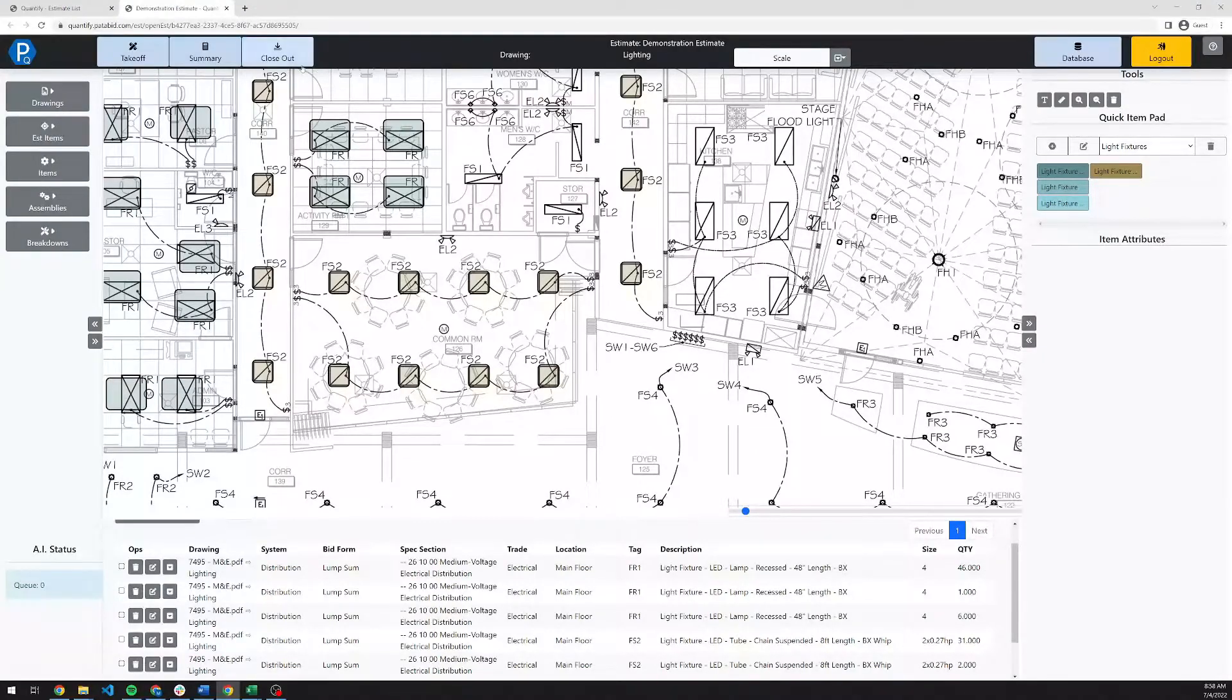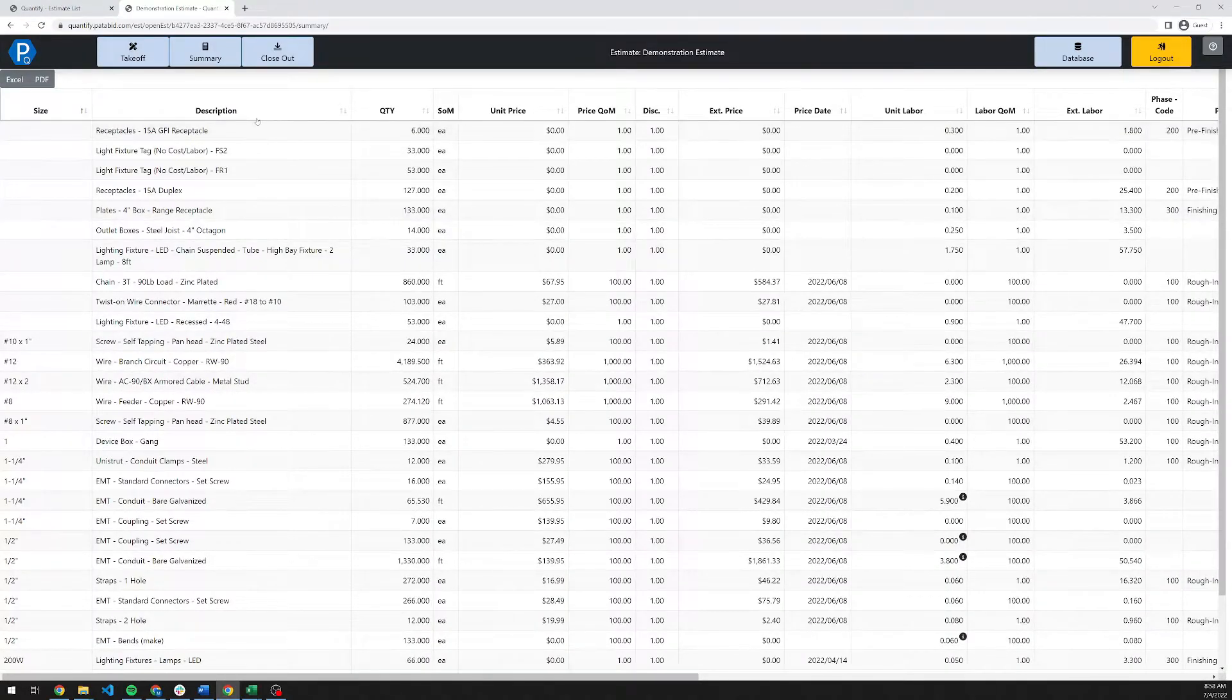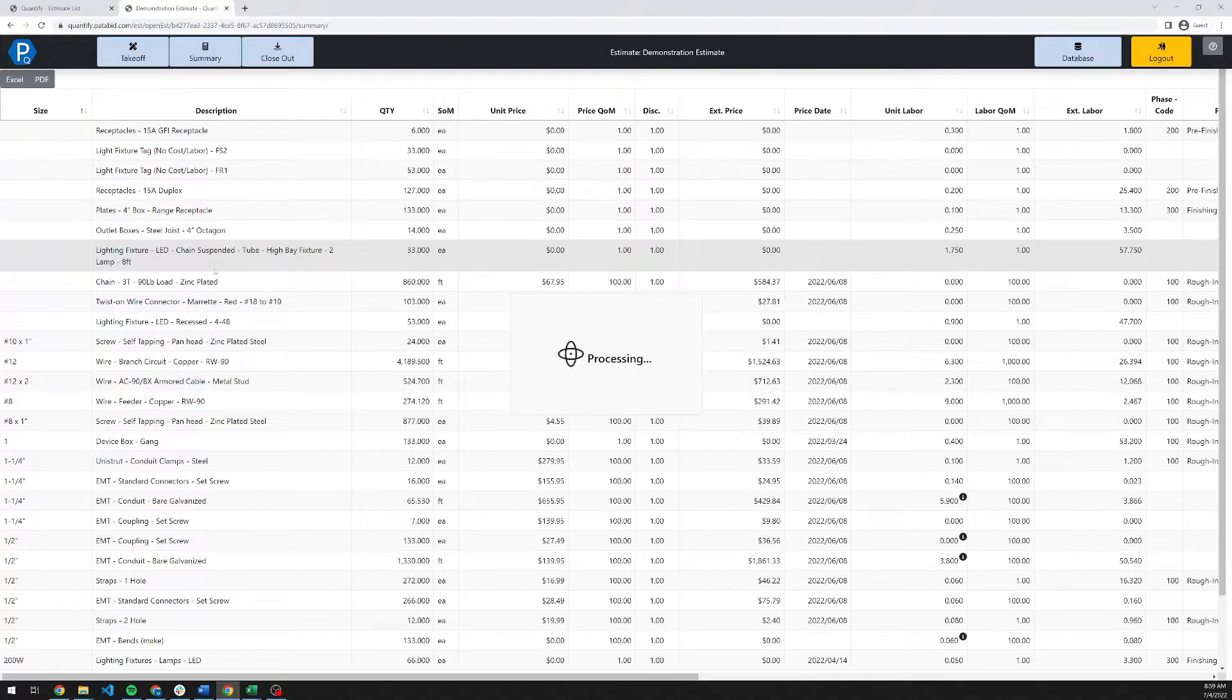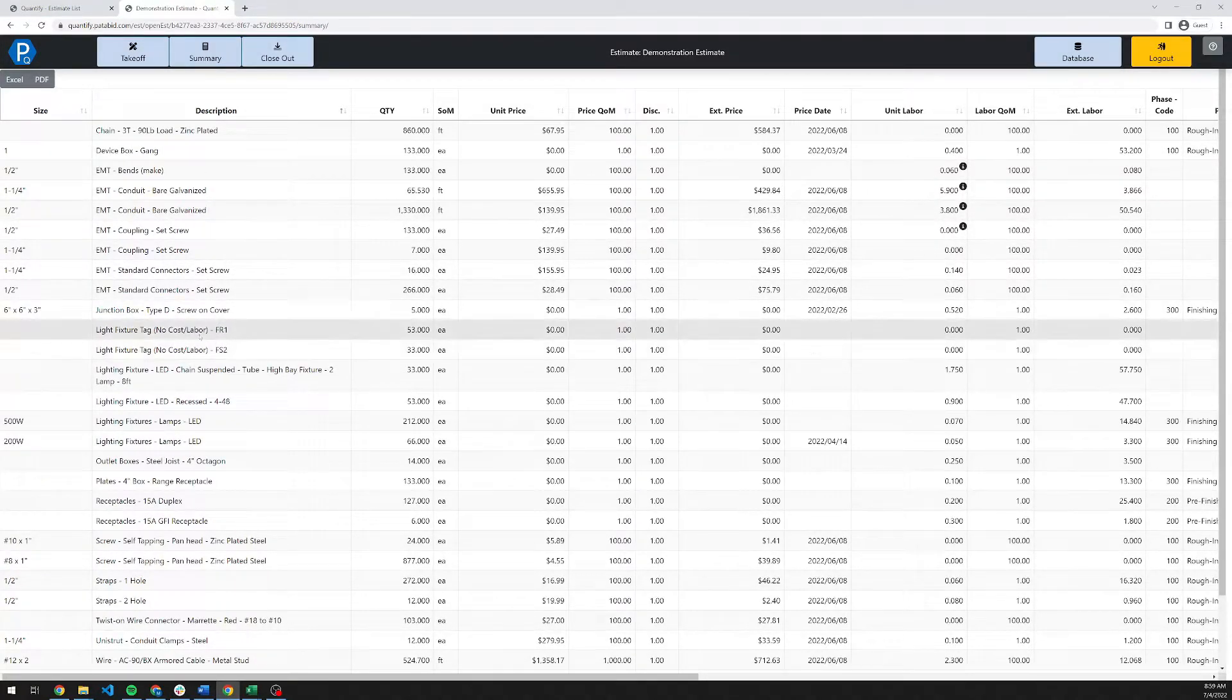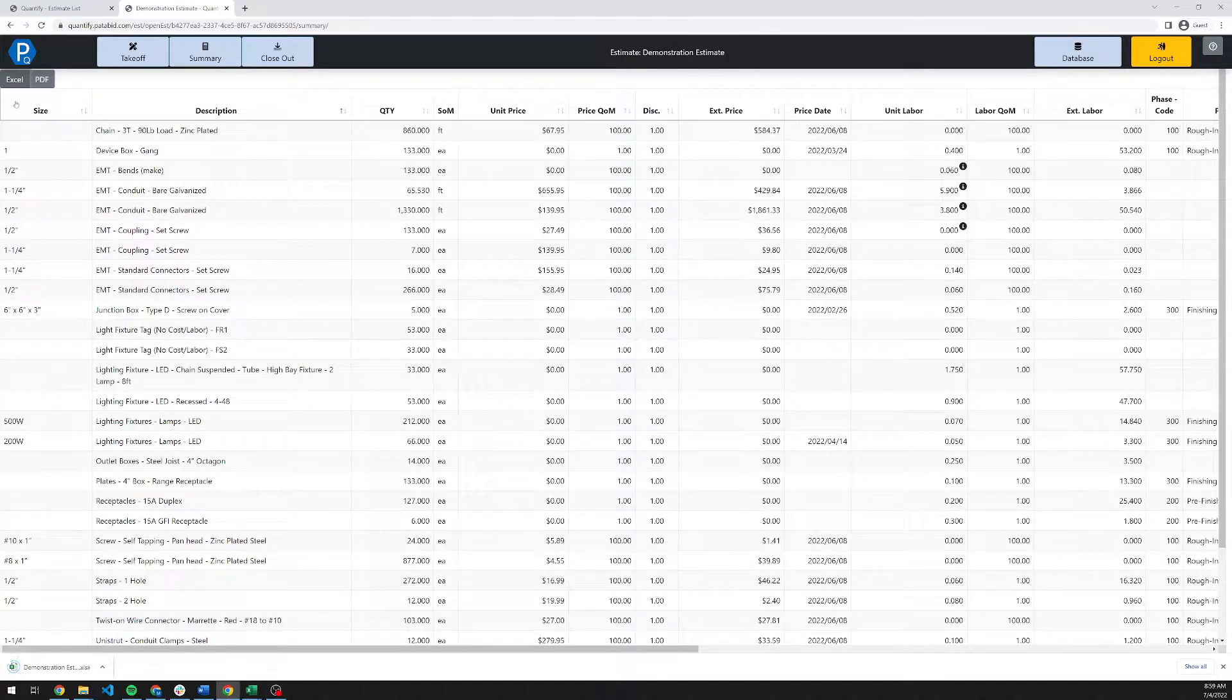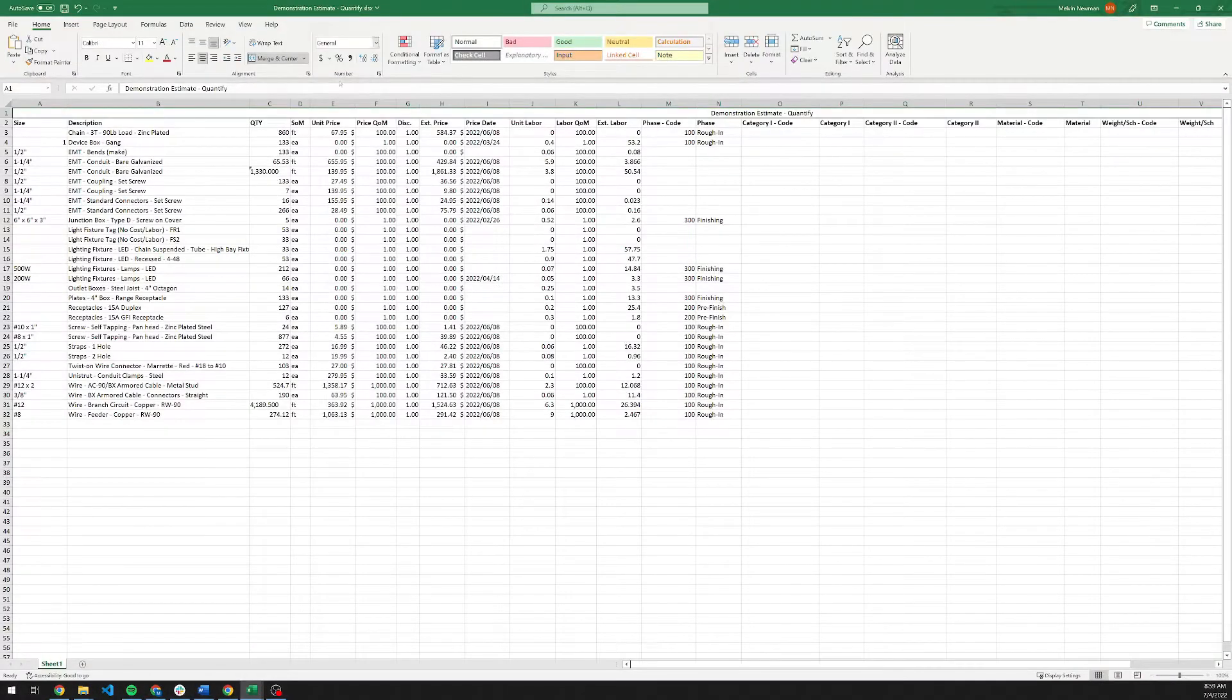If we switch over to the Summary screen now, clicking on this, this is your whole bill of materials for the project. It will take a minute for it to populate here. You can sort by any of the columns up here. So I'm going to sort on description. This is going to group together all of the like items that I've taken off. Here's all of my EMTs. What you get here is, for example, your tag list. We have 53 FR1s, 33 FS2s, and any of your other fixture tags that you brought in. You can then very quickly export this to Excel.